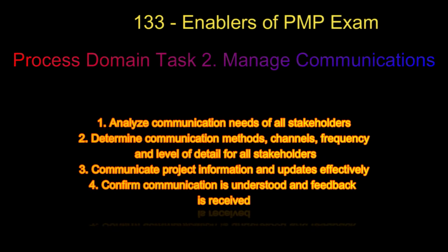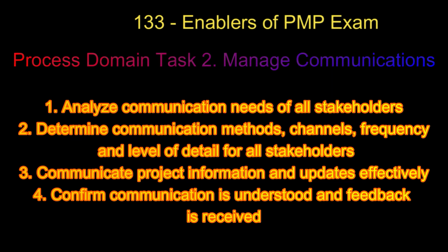Process domain task 2, manage communications. This task has 4 enablers. First, analyze communication needs of all stakeholders. Second, determine communication methods, channels, frequency, and levels of detail for all stakeholders. Third, communicate project information and updates effectively. Fourth, confirm communication is understood and feedback is received.